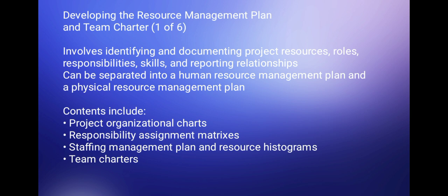Developing the resource management plan and team charter involves identifying and documenting project resources, roles, responsibilities, skills, and reporting relationships. It can be separated into a human resource management plan and a physical resource management plan. Contents include project organizational charts, responsibility assignment matrix, staffing management plan and resource histograms, and team charters.